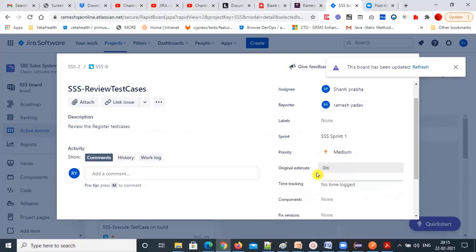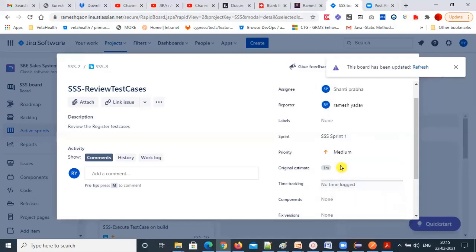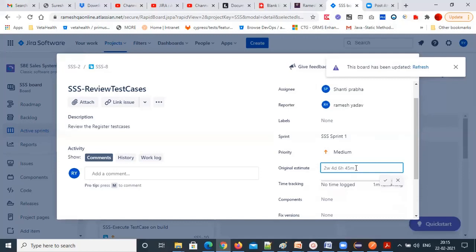You can give estimations — original estimates. Maybe I'll give one story point, since reviewing doesn't take much time. You can give time like one hour, two weeks, four days, six days, 45 minutes. I'll just put six hours — that's enough.